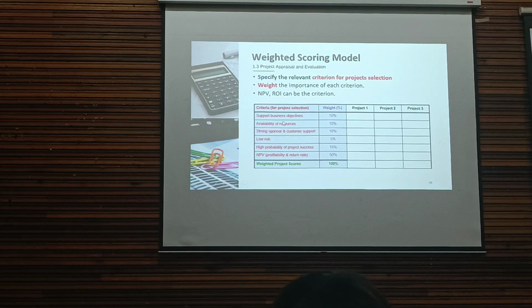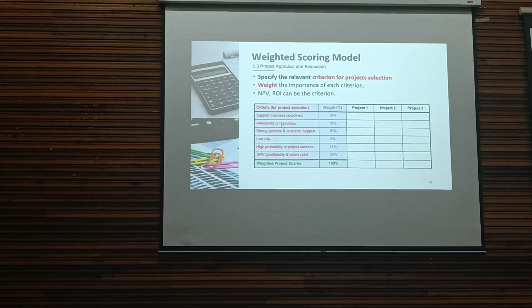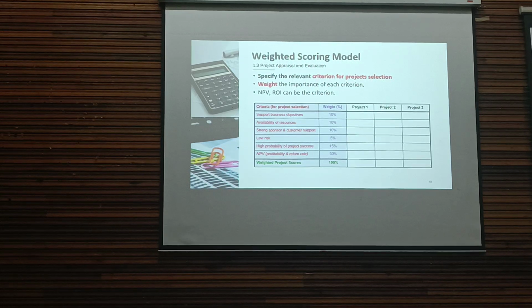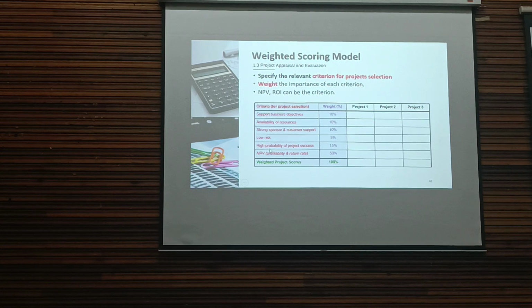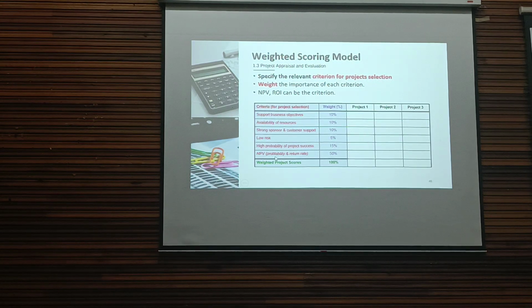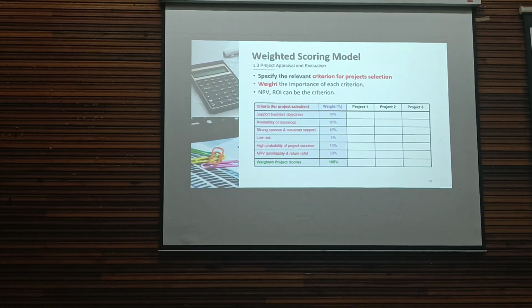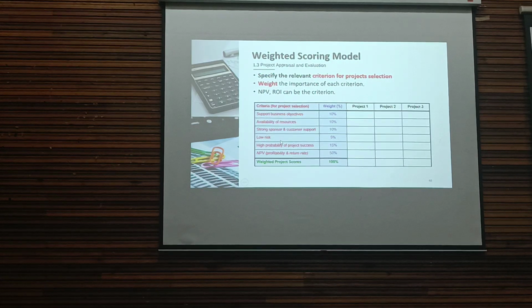You specify what the criteria for project selection are: support business objective, availability of resources, strong sponsor and customer support, low risk, high probability of project success. You can include NPV as one of the criteria.